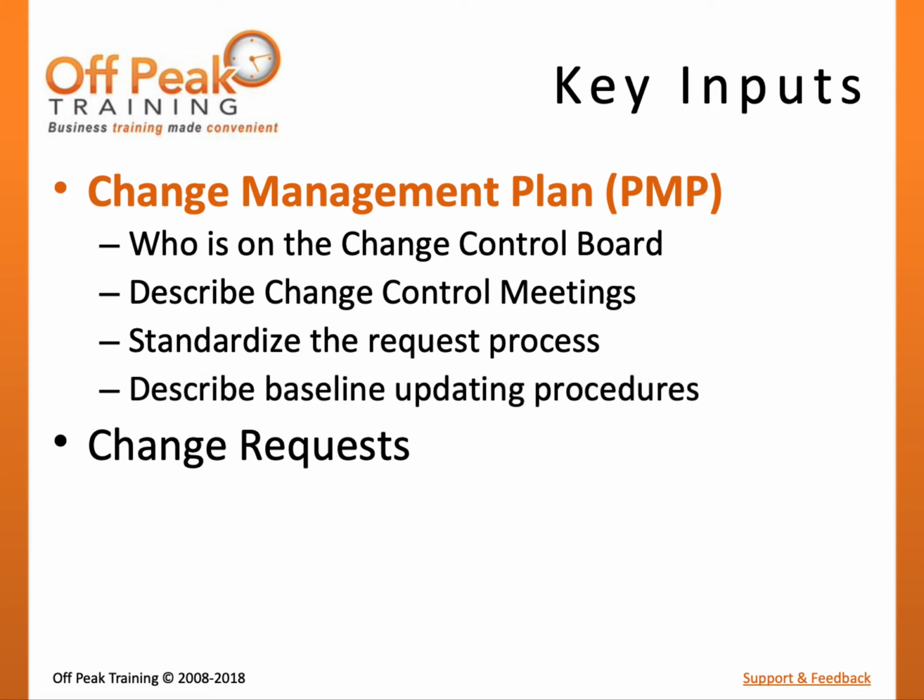Describing the procedures following the approval of a change. Who is responsible for updating? How will documentation be updated to reflect historical information and new changes? How will updates be communicated with other project stakeholders?